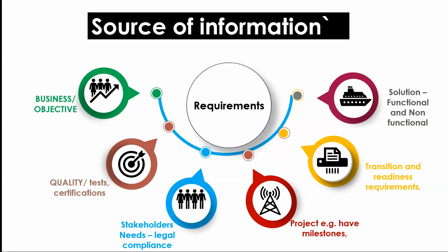What are the project requirements? And it can be as simple as if you are doing work in a school and the school is in operation, you may have to carry out that work in the night and put things back in place so that the following day school work can take place.